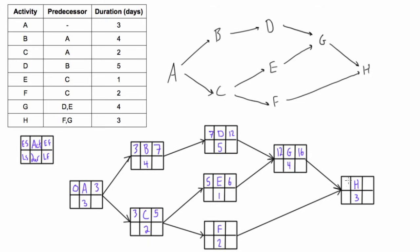We're not sure what to put for H yet because there are two arrows coming in. Going back to C's early finish of five — we bring that to F's early start, so five plus two is seven. Now for H, we have either seven or sixteen coming in, and sixteen obviously wins because H depends on both G and F. We can't start H at the end of day seven because we need to wait for G to finish at the end of day sixteen. So we bring that sixteen in.